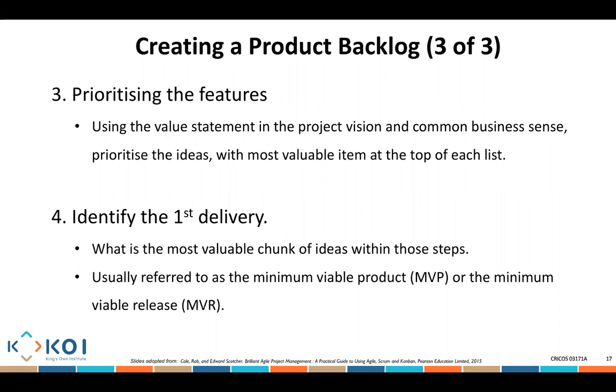If you want to deliver something that the client is going to be able to use, you're going to have to think about all of those features, which ones are the most important. If I combine these together, would I have a product that the client will be able to use, and potentially supply to their clients, if that's who we're actually delivering that system for? So you need to combine all of these main features. You're going to decide which of these are important to create the minimum viable product that I am going to be releasing for the client to use.